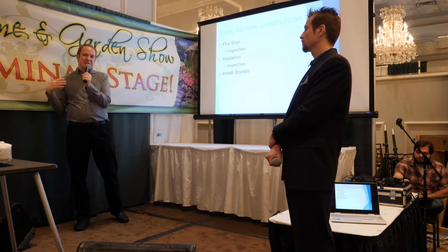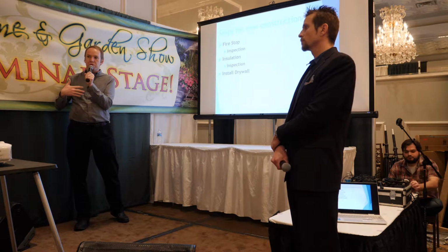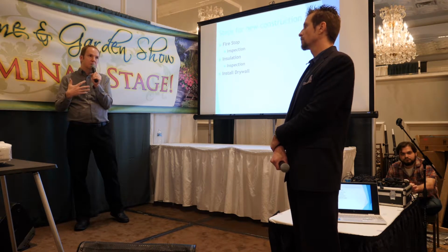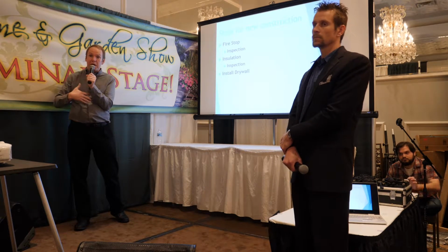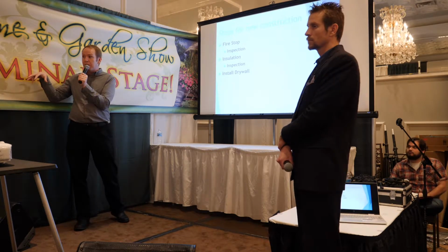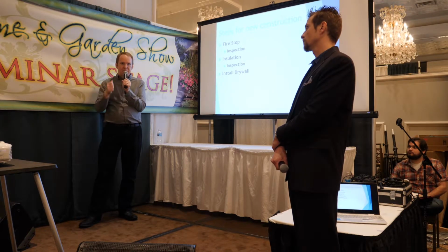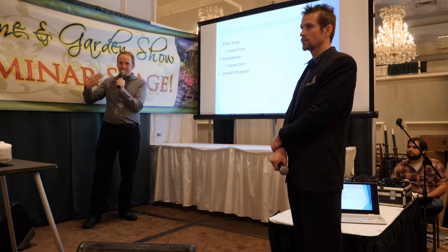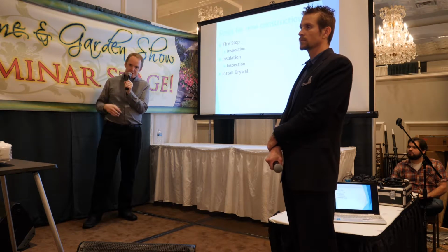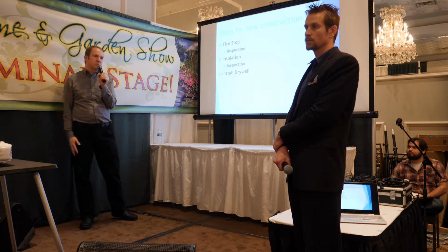At the framing time, it's not too bad, but let's say you're doing your electrical, which is usually the last trade that needs an inspection, and you're waiting 3 weeks. You can't move forward with the house until you get that inspection. So that's why we recommend you order it ahead of time, and keep on the electrical contractor and say, here's our deadline, we need to get this done, I'm not reordering this inspection. Because if you have to reschedule again, it's another 2 to 3 weeks.